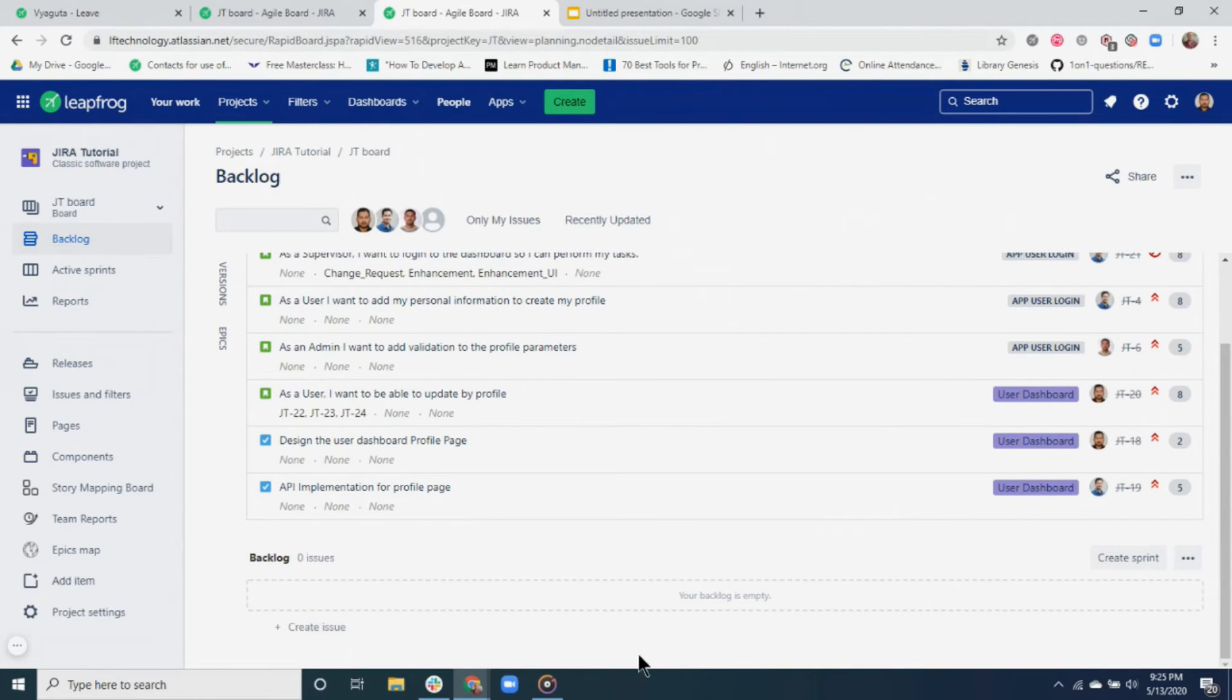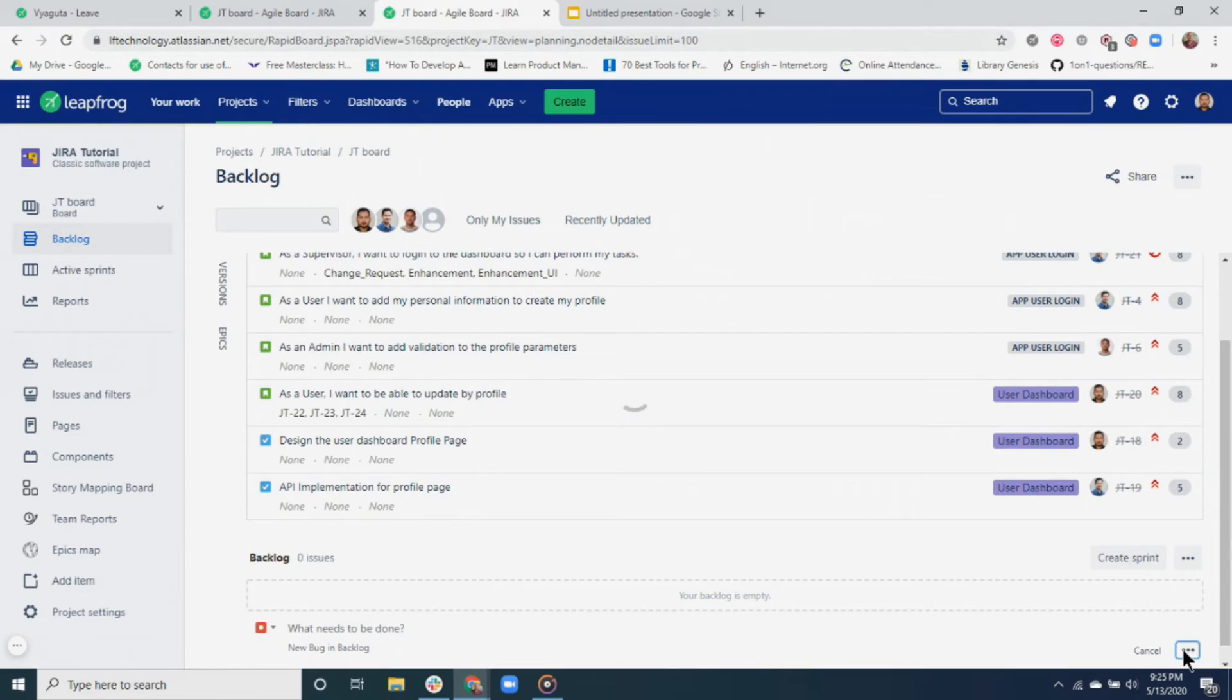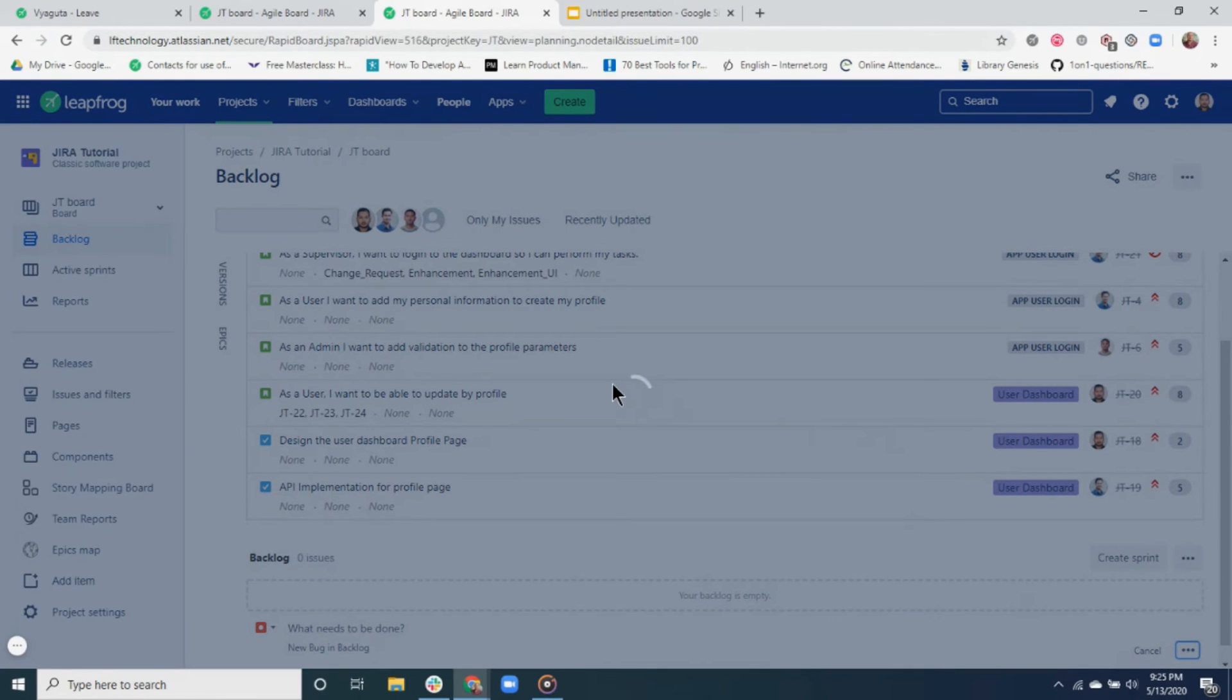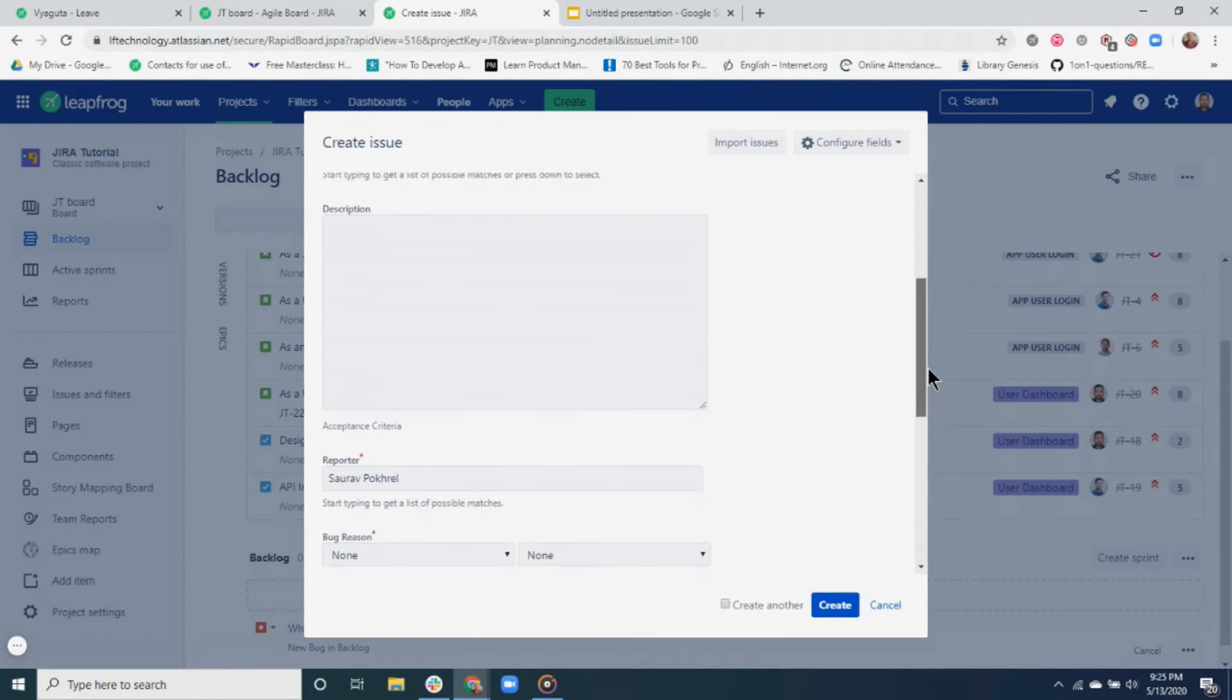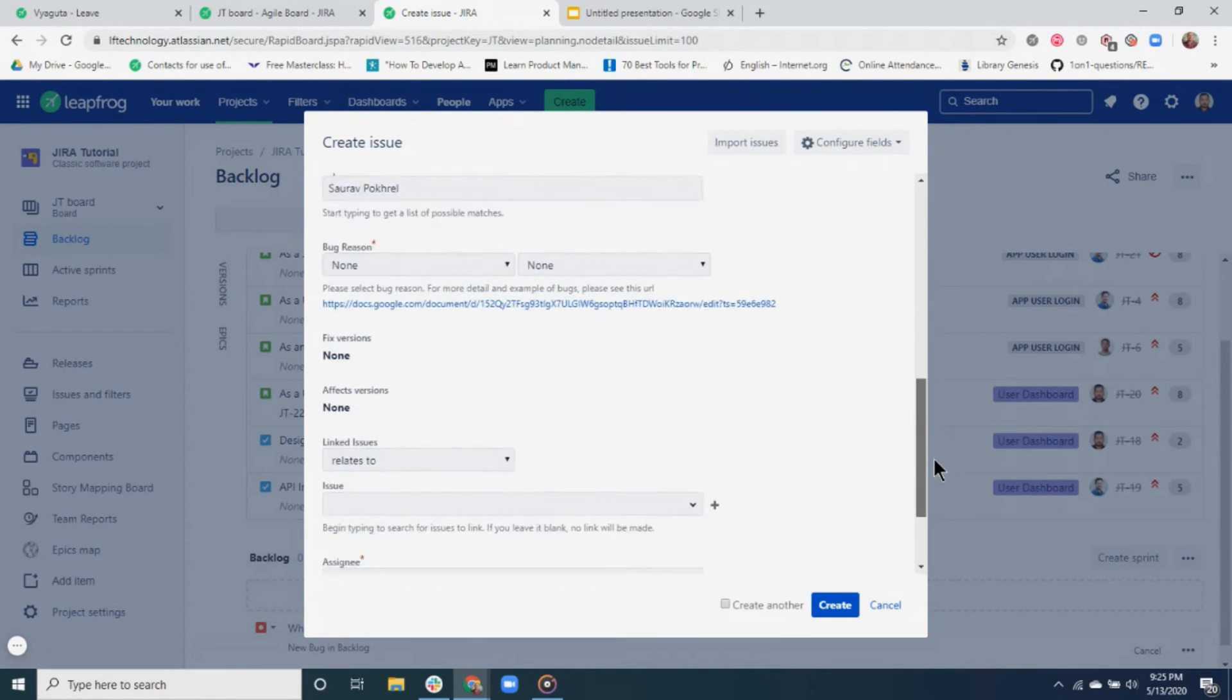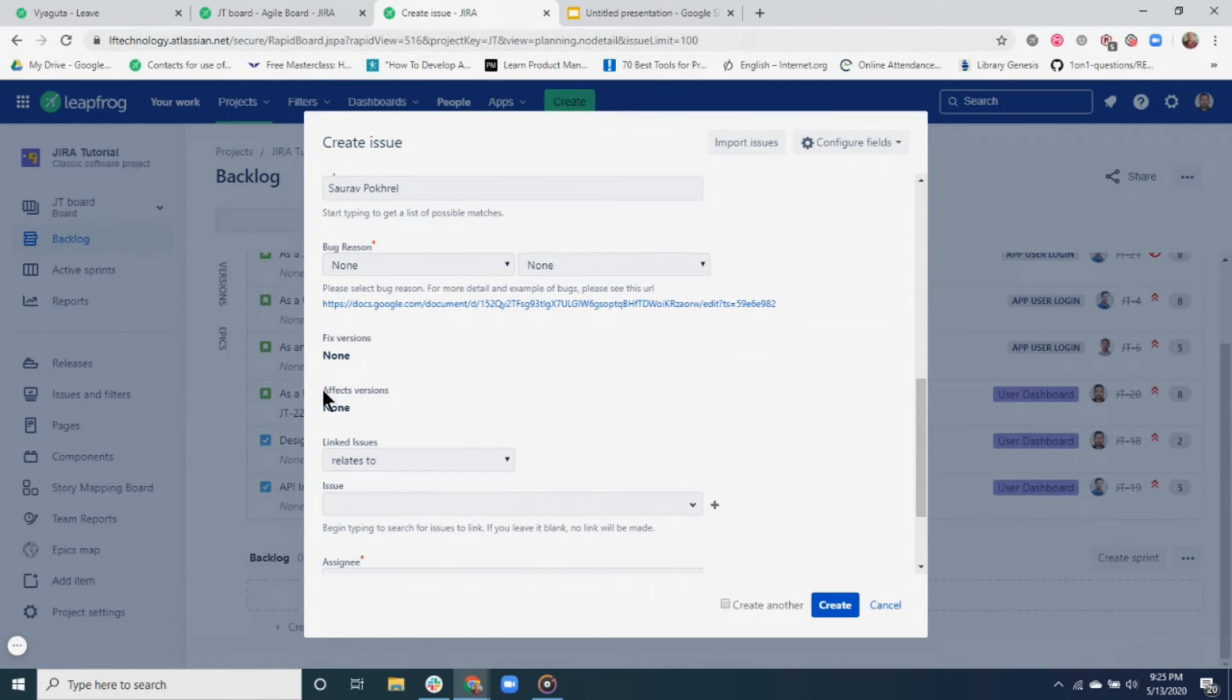A fixed version is used to identify where you plan to fix the features or where it has been fixed, whereas the effects version is used to indicate the version where an issue was found. In LeafFrog, we are more accustomed to using only fixed version to tag our UAT or production releases.